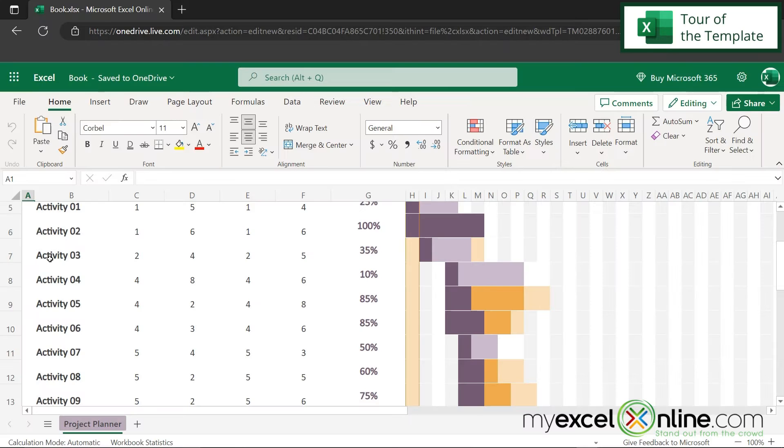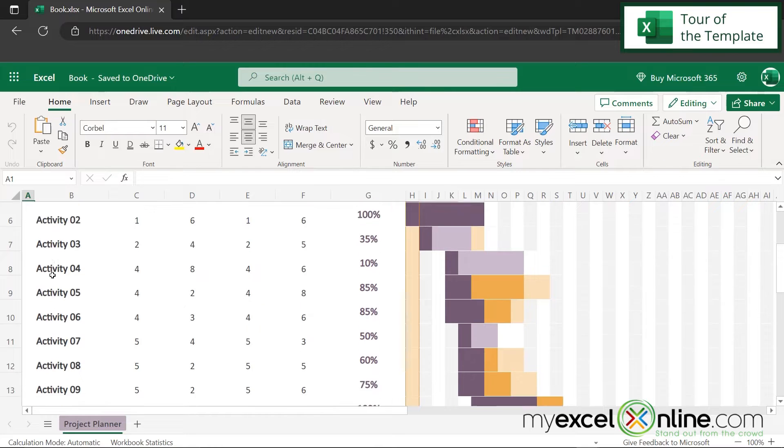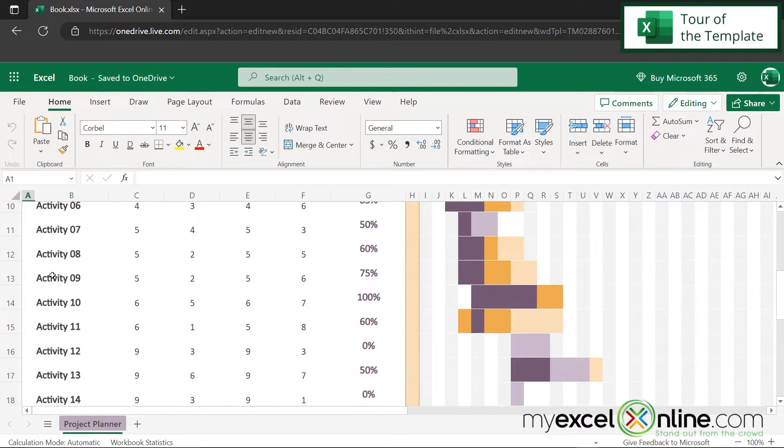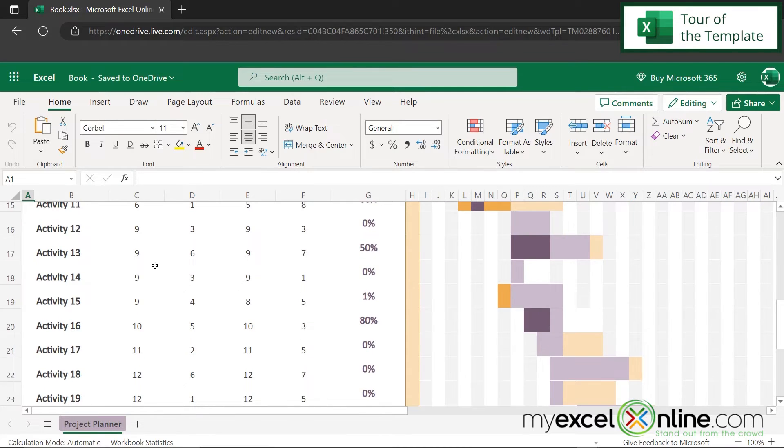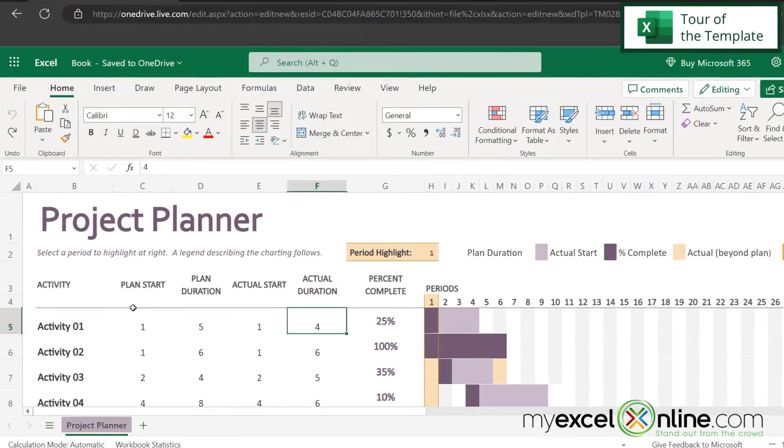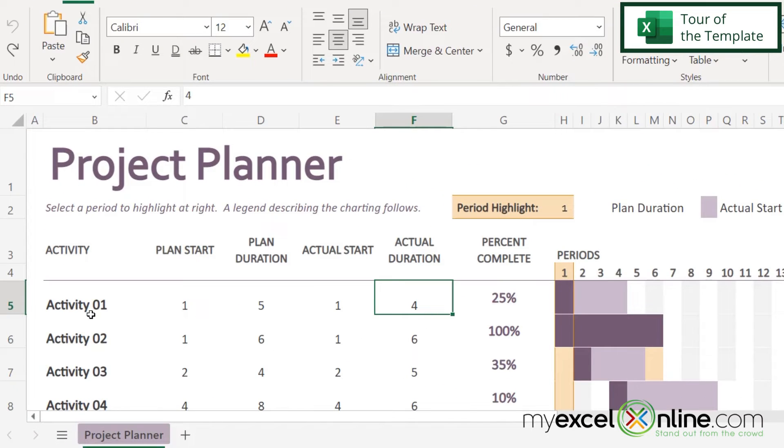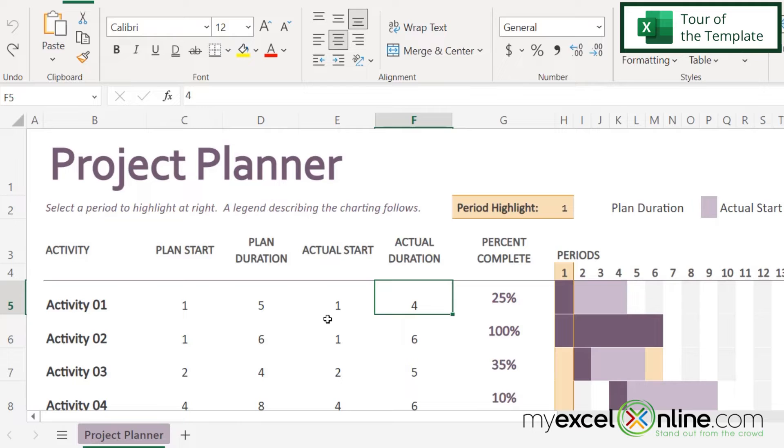If I look over here to the left, I can see some generic activities have been entered. And so for each activity in here, I can see that I have a plan start, a plan duration, an actual start, an actual duration, and a percent complete.